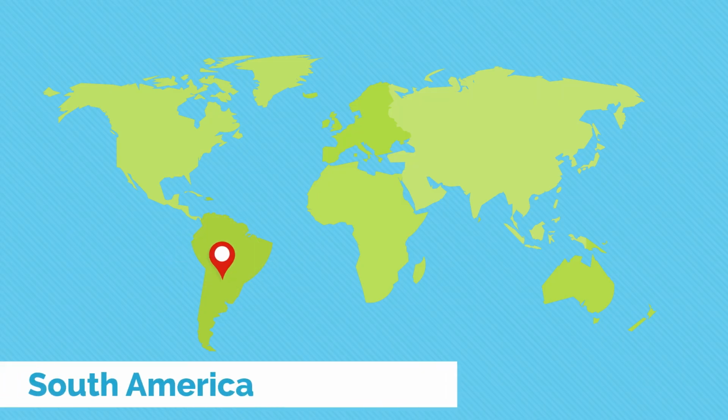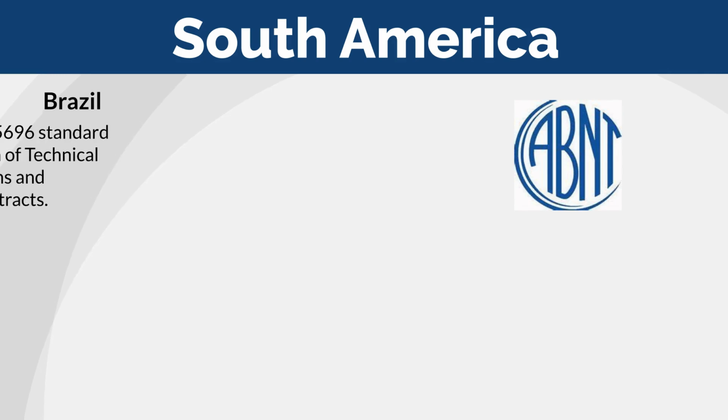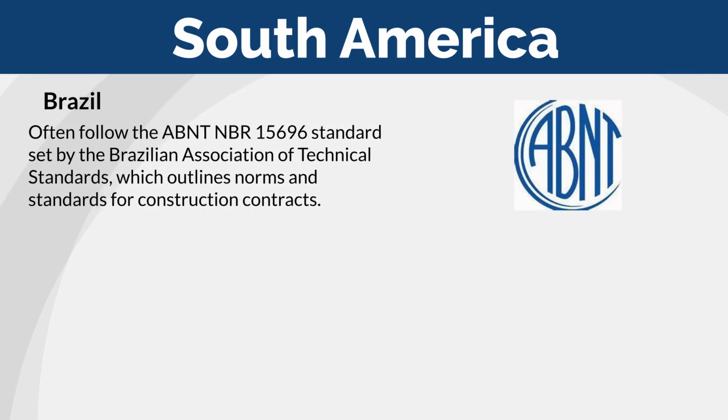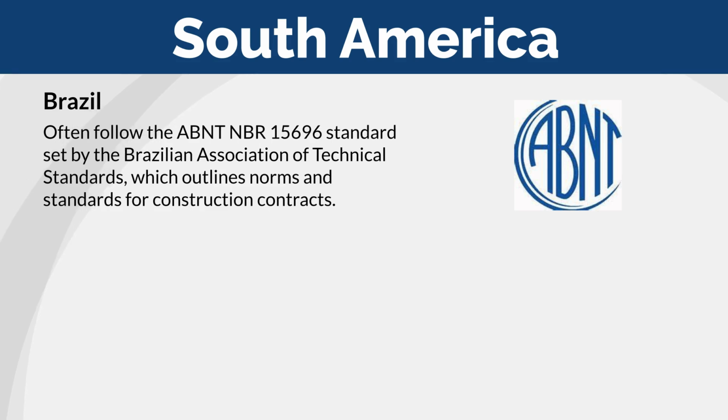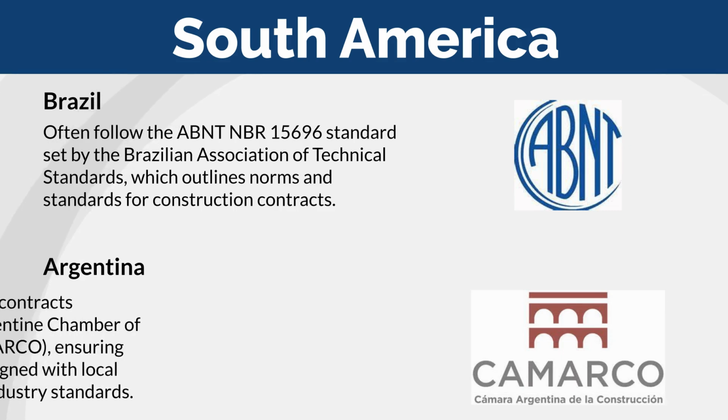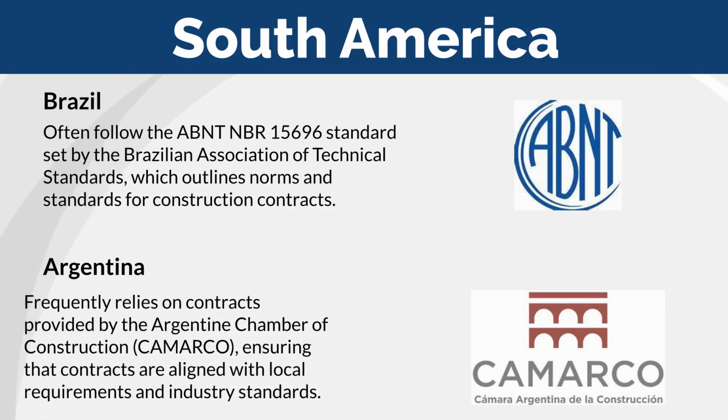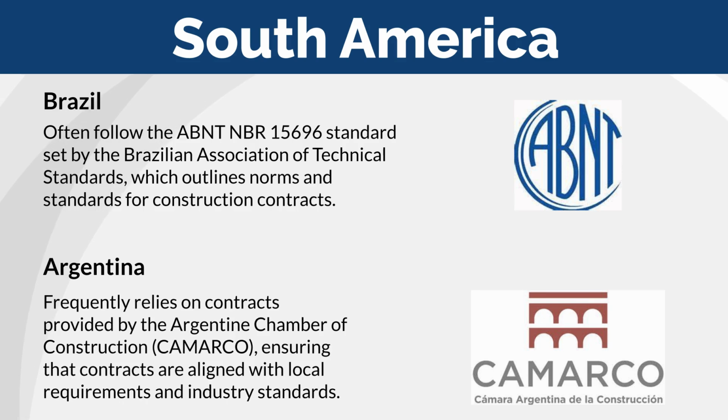South America. In Brazil, construction contracts often follow the ABNT NBR 15696 standard, set by the Brazilian Association of Technical Standards, which outlines norms and standards for construction contracts, reflecting Brazilian legal and construction practices. Argentina's construction industry frequently relies on contracts provided by the Argentine Chamber of Construction, ensuring that contracts are aligned with the local requirements and industry standards.